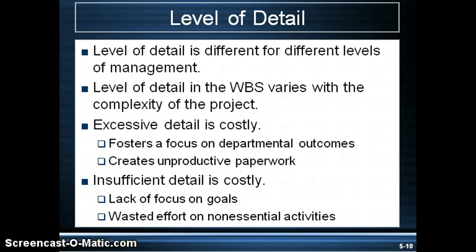With the management of the organization, senior management is going to require a different level of detail than the frontline manager. Senior management will typically want the high-level details of the project, nothing more. Middle management may want only milestone-type information. The first-line manager will want more detail down to the work package or task level. The level of detail in the WBS varies with the complexity of the project. It's critical that the level of detail be balanced to meet the needs of management. Too much detail will result in departmental outcomes instead of deliverable outcomes, and excessive detail can create more paperwork and be tougher to manage. Too little detail can lead to lack of focus or wasted effort on non-essential tasks.